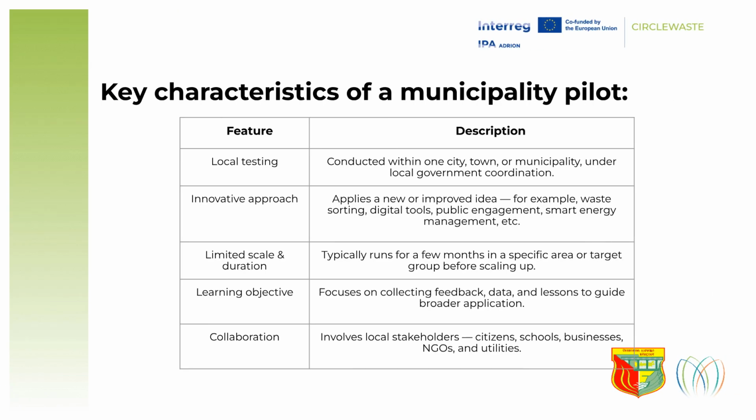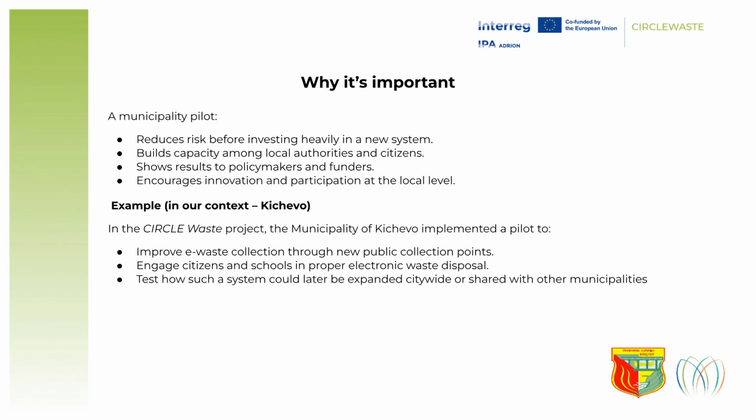confidence. Key characteristics of a municipality pilot include local testing under government coordination, an innovative approach, limited scale and duration, a learning objective focusing on data and lessons, and collaboration with local stakeholders. Pilot projects are important as they reduce risk before heavy investment, build local capacity, show results to funders, and encourage innovation. For example, Kicevo's pilot improved e-waste collection and engaged citizens and schools in proper disposal.